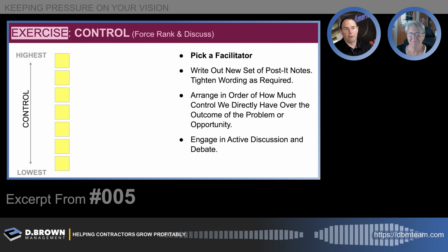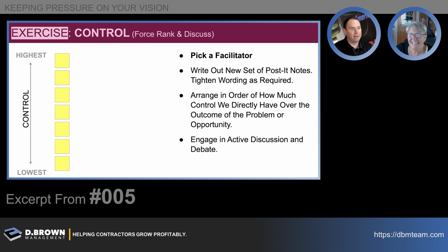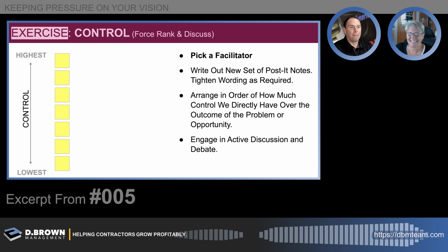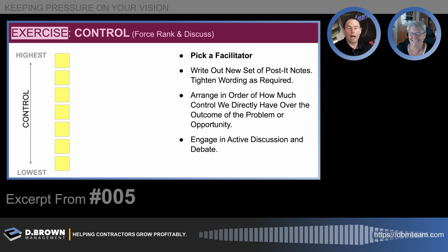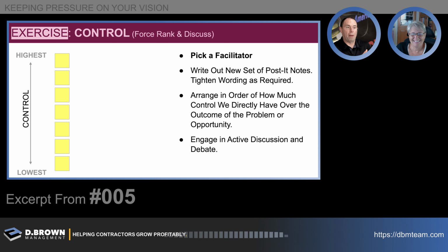And control meaning, like I went out for a run this morning and it was pouring down rain. I had zero control over it. Yesterday it was super sunshiny. Got very, very lucky. There was exactly a 1 hour break in the rain. Got our mileage in. But weather is a huge impact on a construction schedule. How much control do I have over it? Not much. To the degree that maybe I could choose what my start time was, or how I phased out a project to shift the probability around certain rain days. But I'm not in control of the weather. As soon as you think you are, it's going to let you know that you're not.